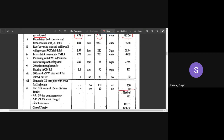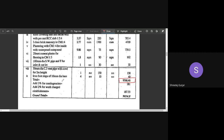In the abstract, list each item's name and quantity, multiply by the given rate to get total amounts. Then add 3% contingency and 2% work-charged establishment charges — a total of 5% extra. The grand total for this septic tank comes to ₹9,834.